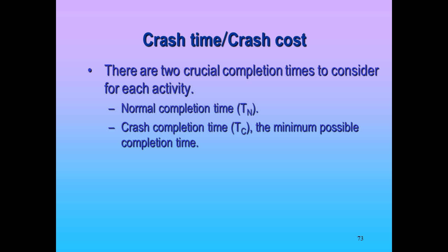So all things being equal, which one provides better bang for my buck? Activity A or activity B? Tyler? B. $100 every day I reduce it. What also matters, though? I don't have that piece filled in. What if I told you activity B had slack of 50 days and activity A has slack of 0 days? Does that change your mind about where I'd spend my money?